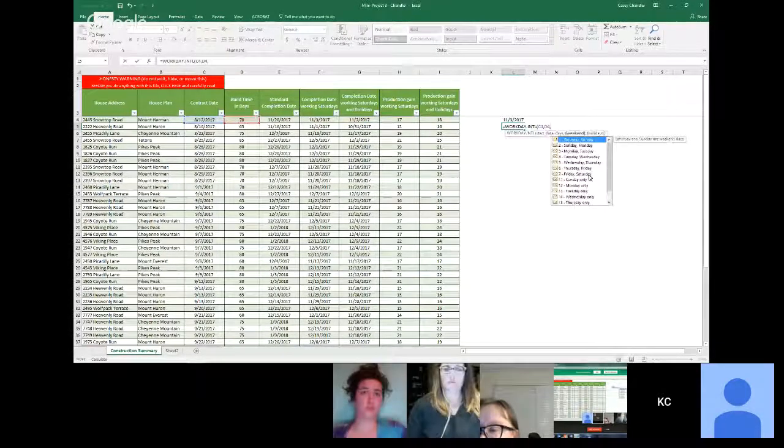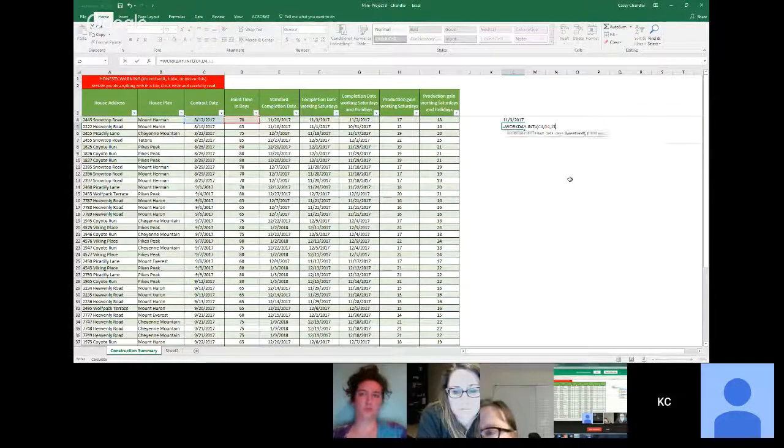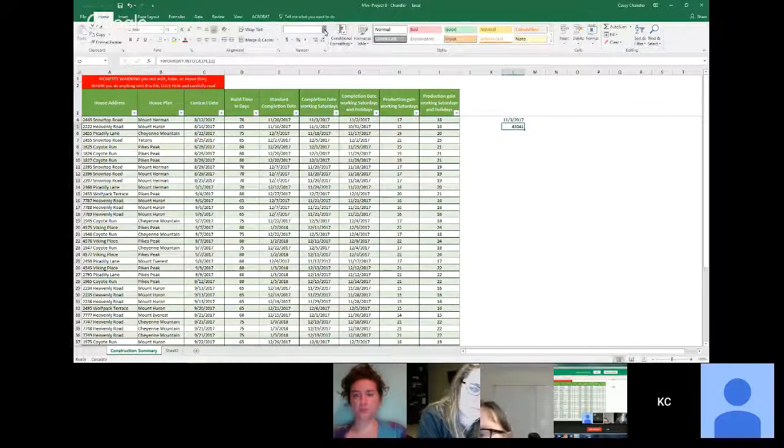Now, the weekends, what are the weekends? Well, we're still going to be the same set because we're still not going to work on Sunday. Saturday we're working because we're told to work on Saturday and holidays. So I'm going to select the 11, which is Sunday only. That's the weekend. And now, holidays is bracketed, which means it's optional. So I don't have to enter anything. And since I don't want to exclude holidays, all I have to do is click. And now I'm given a new bit of information.